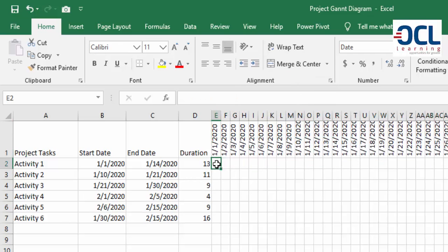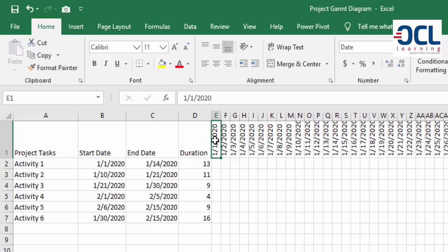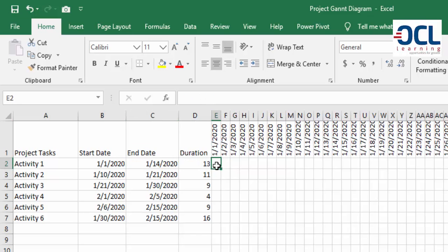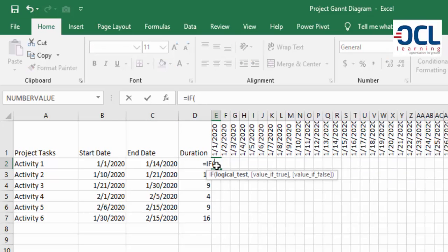Now we're going to write an IF function that tells Excel to mark here or to return X if this date is between the start date and the end date. I'll start writing equals IF, then because I have two logical tests I need to include the AND function.